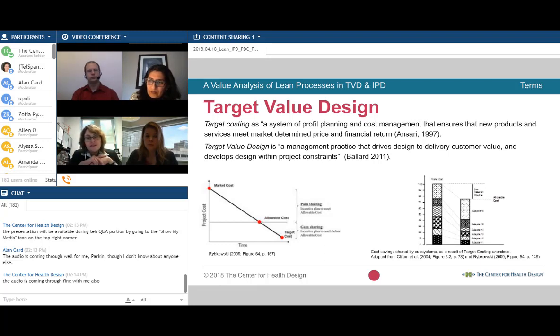But if you actually have the mechanical engineer in the room and they know that you have Low-E glass, they could say, well, we can downsize our chillers and we can actually shrink our duct size, the diameter of our duct size. And if the structural engineer is in the room, they can say, well, if you shrunk your duct size, we can actually reduce our floor-to-floor height. So as you can see, the mechanicals and the structural people have actually shrunk their portion of the cost, but the glaziers have actually increased their portion of the cost.